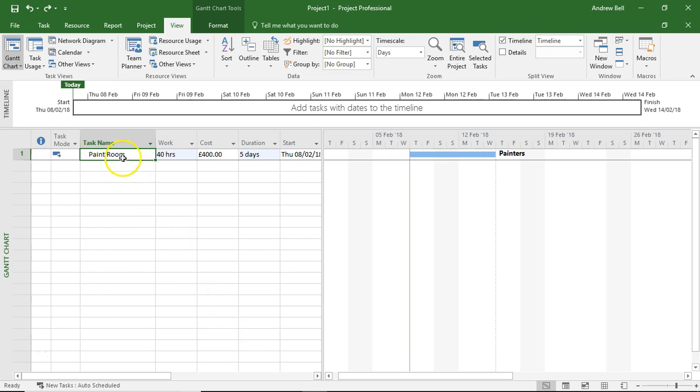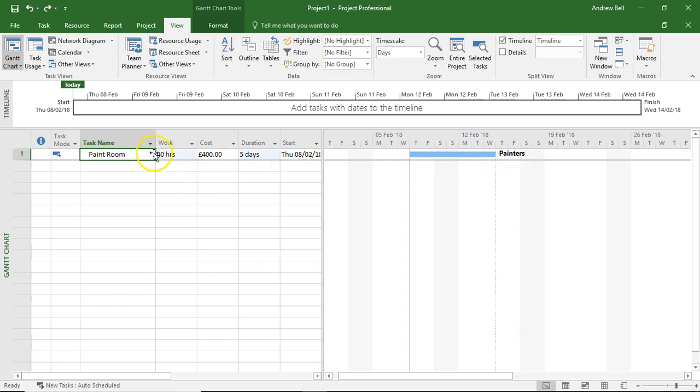At the moment I've got a task in my project plan which is Paint Room. Because I put five days duration and assigned a resource called Painters, it's defaulted to 40 hours of work and a £400 cost.